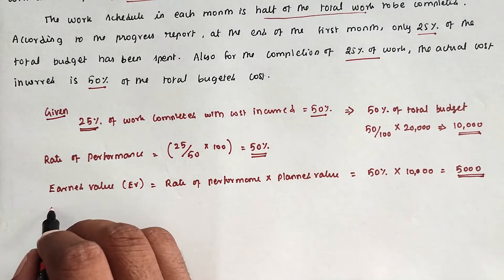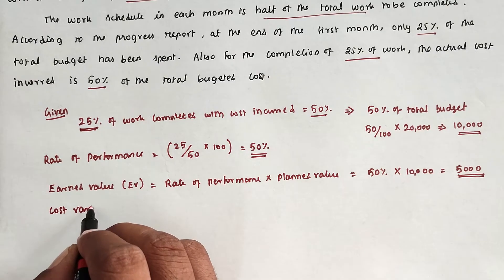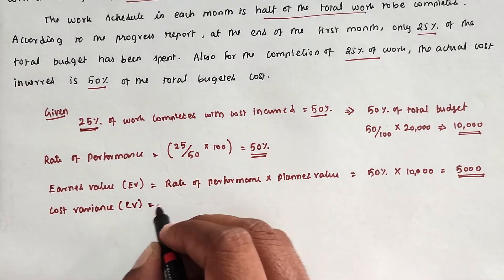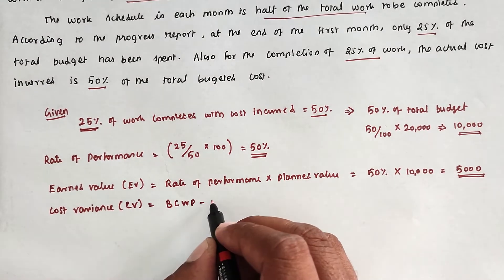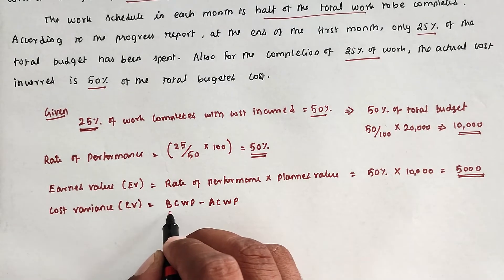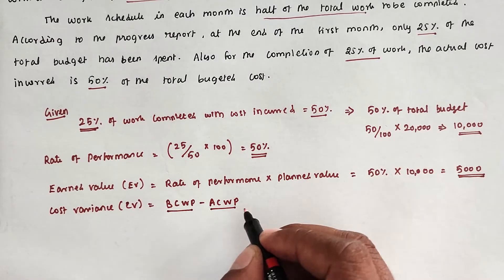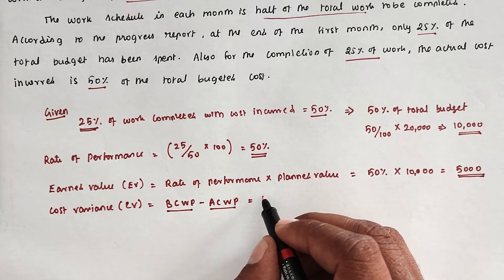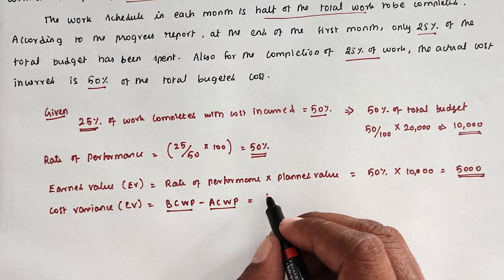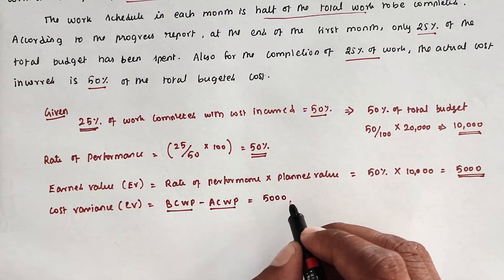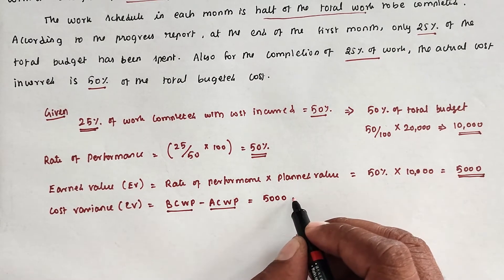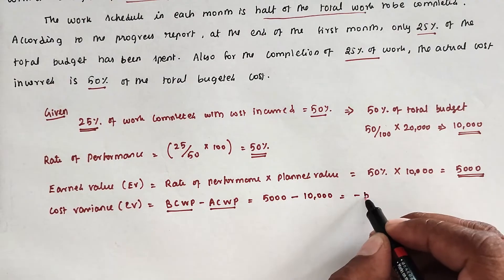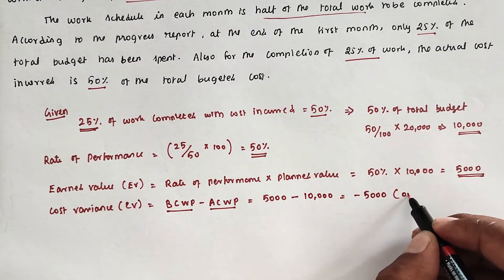Next is Cost Variance (CV) = BCWP minus ACWP, that is Budgeted Cost of Work Performed minus Actual Cost of Work Performed. The budgeted cost of work performed is 5,000, which is what was allowed to spend in the first month, minus the actual cost of 10,000, giving minus 5,000. This means the cost is over-utilized.